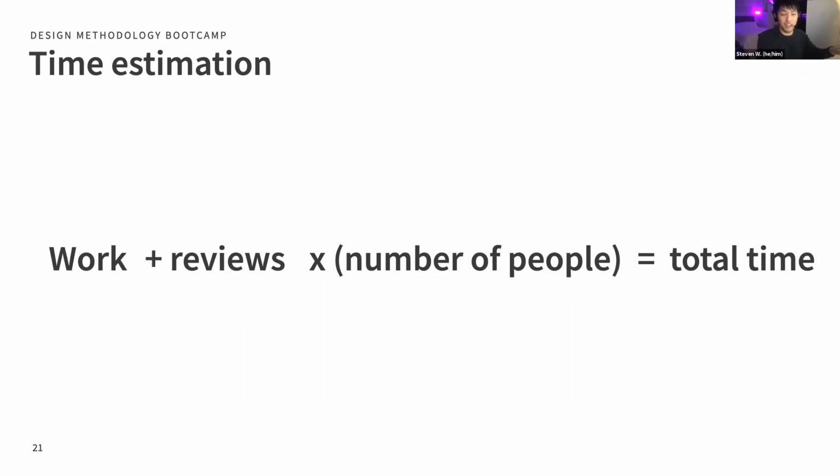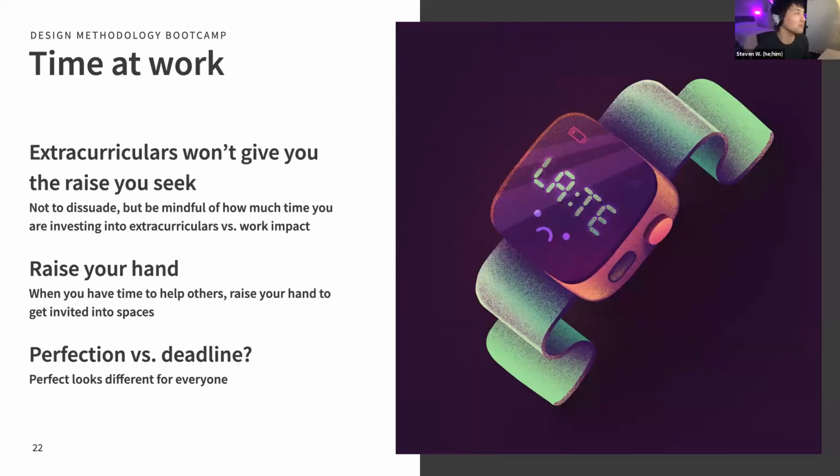So as we break this down, why we suck at identifying how long something takes is because of all these variables we totally ignore. When was the last time you sat down and you're like, okay, how many people are going to review this? So I'm going to have to actually add a buffer to that much work. We forget that. We're like, wireframes, easy, 5 hours, done. It's getting reviewed by a 100-person, boo. You're like, oh no, oh no. But yeah, think about all the different variables that come up that will require you to add a little bit of buffer so you can be successful.